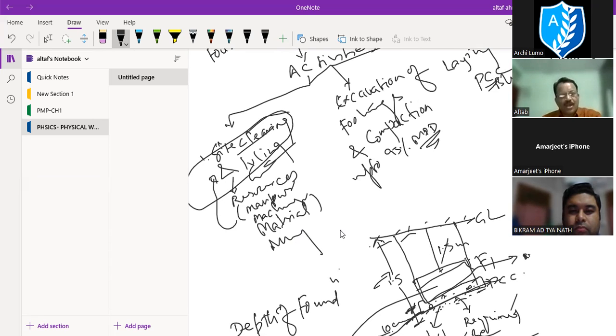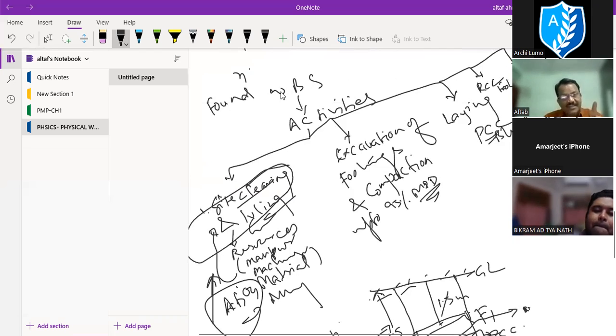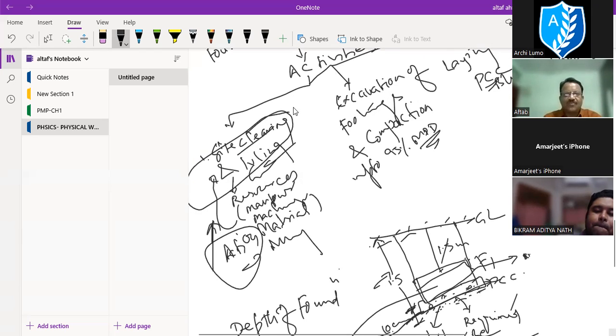So basically, it is the action on the project. You are taking this action. Any action will be regarded as an activity, because that action will involve or consume resources, I mean manpower, machinery, material, money, for completion. So any WBS will contain lots of activities.